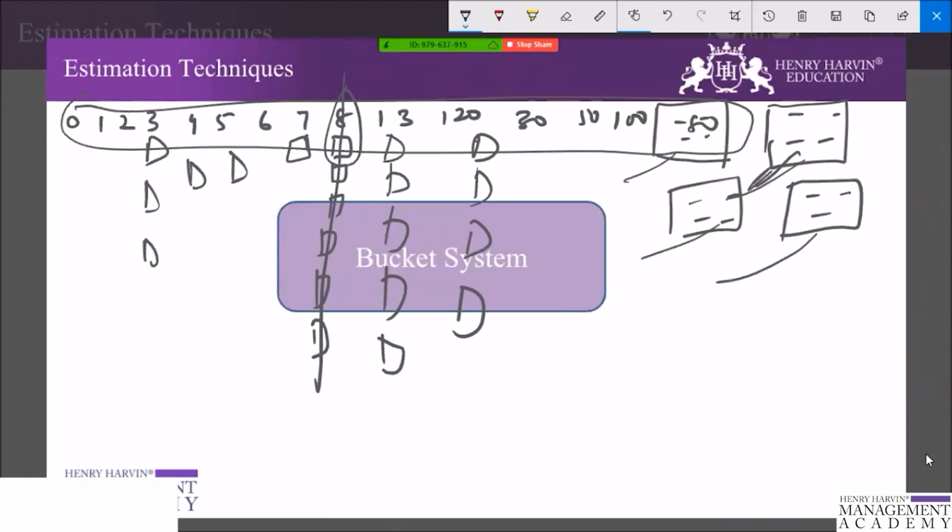Once this is done, you can do a sanity check where everyone quietly reviews the items on the scale. If a participant finds an item that they believe is out of place, they are welcome to bring it to the attention of the group. The group then discusses it until consensus is reached and places it in one of the buckets. Write the bucket numbers on the card so that the estimates are recorded.